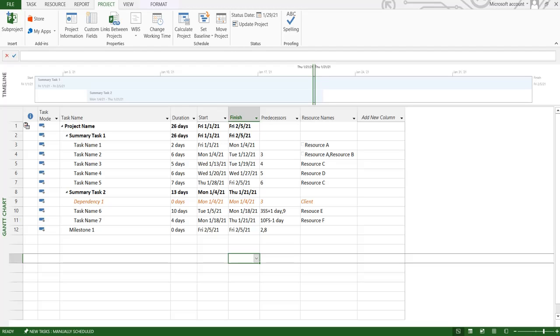Once we set a baseline for our project, that's usually done when you define a project schedule, and then we share it across with all the stakeholders, and then we set a baseline. So when the work starts on the project, we keep track of the actual durations that are taking place and the changes that are coming to the project, so we can benchmark and identify the variance in the project timelines once we have set the baseline.